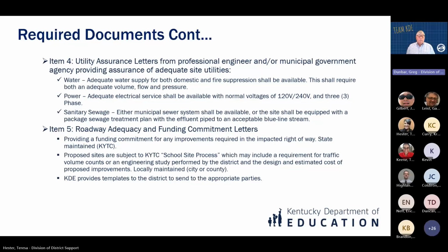Item number 5, roadway adequacy and funding commitment letters. These are the template letters that I referenced earlier, requesting a funding commitment for improvements in the right-of-way, confirming the roadway in fact is adequate for the proposed traffic.